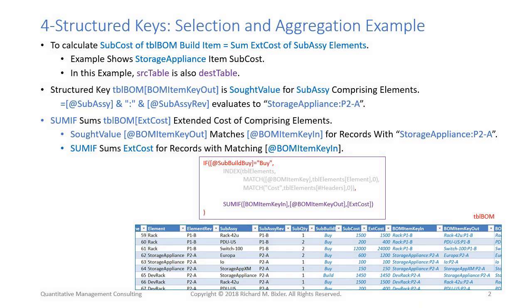An element is typically built from several subassemblies that have to be built or bought. This BOM file is used to explode elements into their comprising subassemblies to be acquired in order to deliver an element that's allocated. So in this table, each element is broken into several records, one record for each subassembly that needs to be built in order to supply the element. The needed subassemblies are specified in fields subassembly and subassembly rev.